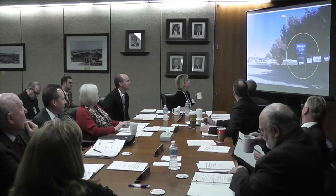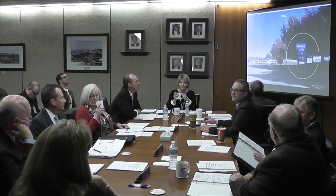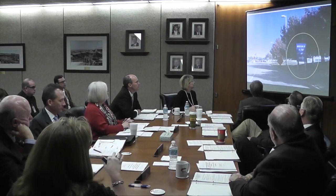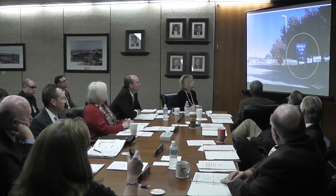So, right before Thanksgiving, we opened the new parking lot. This is in response to the garage construction project. We're going to be taking spots away, and we don't want to have to turn customers away because we don't have spaces for them. On the main airport entrance road, to your right, there used to be an employee lot. We relocated the employees to another parking area, and this has opened up about 232 spaces, and it's a self-serve lot, basically. We want to give the expectation that you're going to walk from here to the terminal.